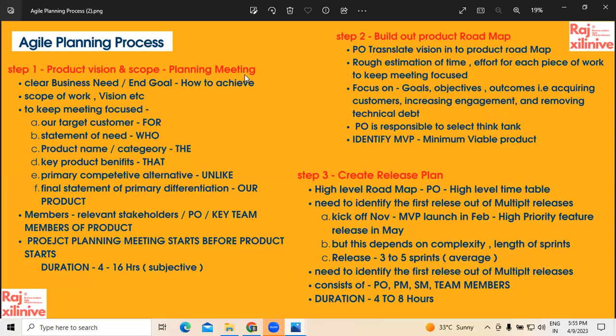Second, sometimes during the sprint, the first sprint we are working on, let's say the customer has added a few more requirements to the product backlog, right? At that time, for example, there were 3 user stories which are high priority. Whenever other user stories were added, what will happen? Those priorities will get affected. Those may not be the high priorities, because the new items might be the priority. So this is also product backlog refinement.